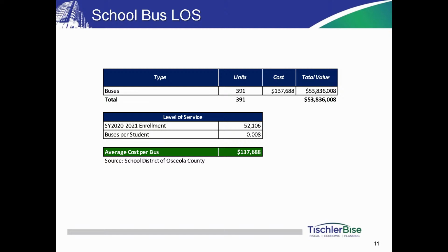I mean, we could, as an option, apply ENR, Engineering News-Record, inflation factors to 2017, 2018, 2019. Can you just delete it altogether though, like in statistics? I mean, it's 2000, that's too far back.